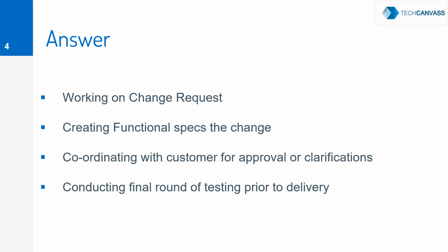I coordinate with the technology team and bring them with me so that when I'm presenting the functional requirements, if there is a technical question on how to go about coding the solution, they can answer the question. Typically, after the presentations, I request the customer to send us an approval, and then we can start working on it. If the customer is looking at a cost for the change request, they might have to go back and take approval from their senior management. So it takes a bit of time. Till the time the approval comes in, we don't start working on the change request.